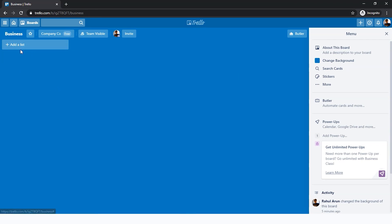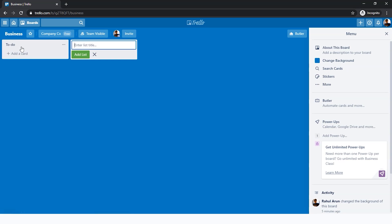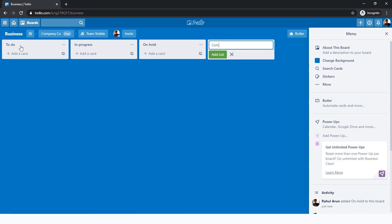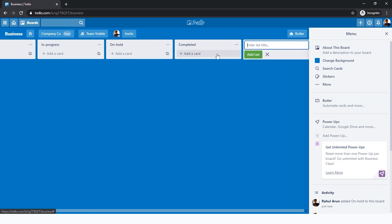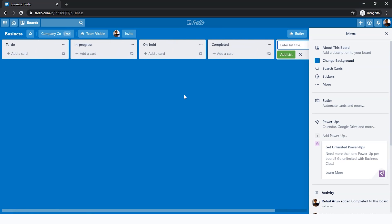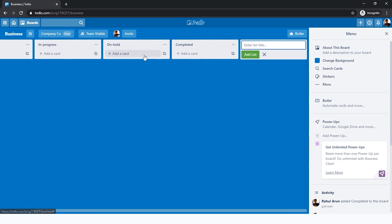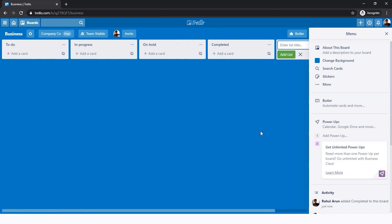Now let's get back to our board. First you see 'add a list.' This basically refers to the different processes that you want to follow in this board. First of all, we'll add a list title. I'm going to add 'To Do.' That's the first list. Then there's 'In Progress,' 'On Hold,' and 'Completed.' Here we have four lists which represent the processes in this business.